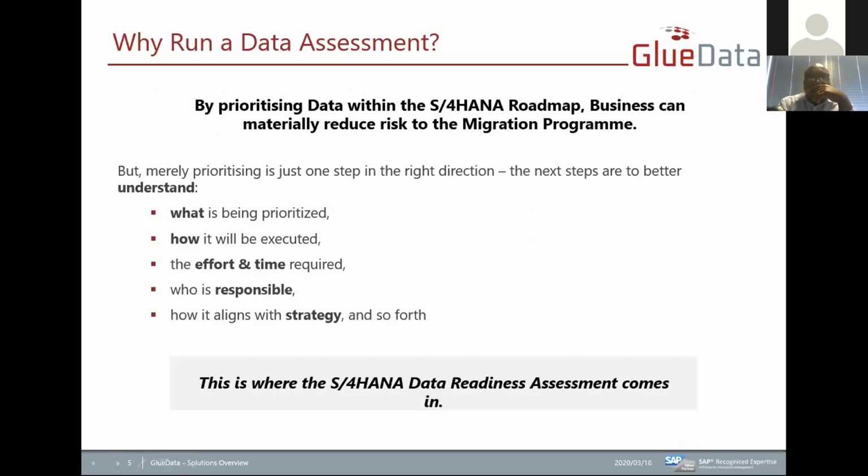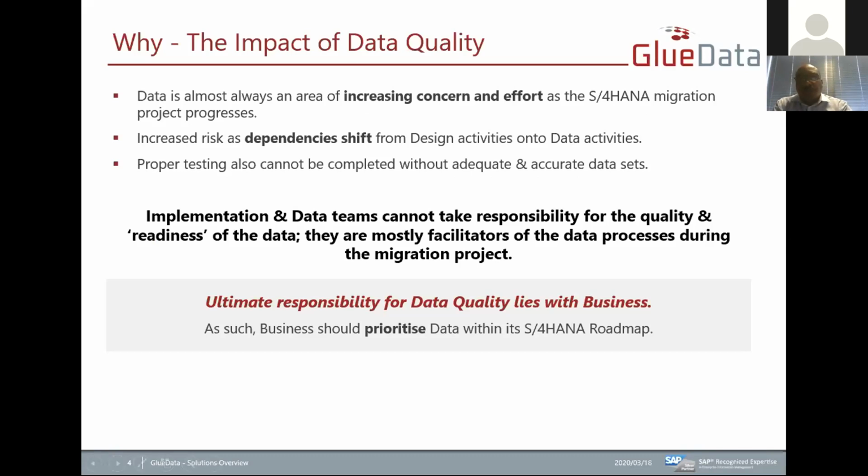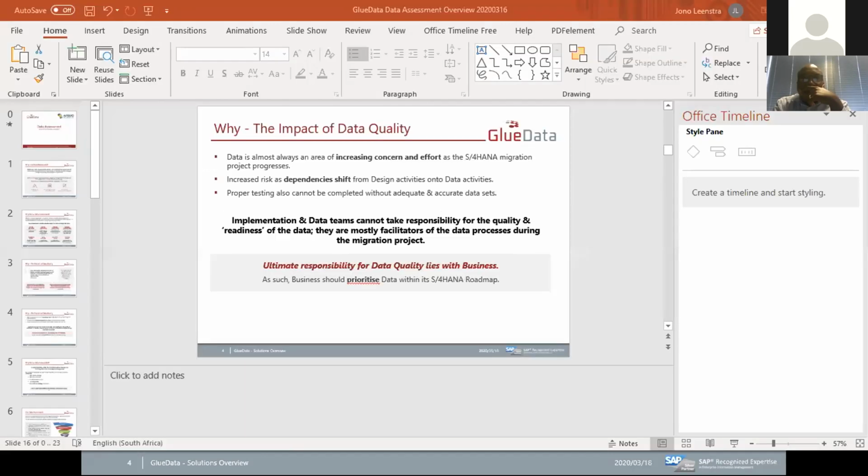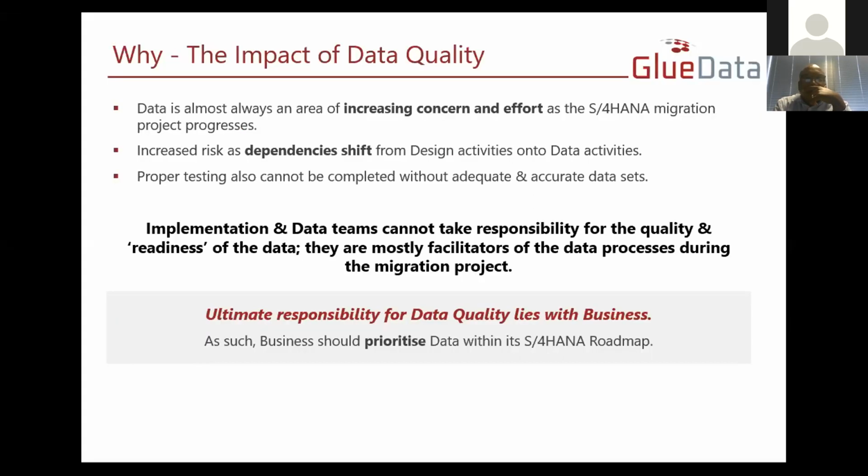Just go back one. An example I can think of on a recent S/4HANA project at a company: the business delayed the preparation of their customer data for the production load. Ignorance about these data requirements meant they sent dummy customer data, which was used during the development cycle, for load during the production cutover.